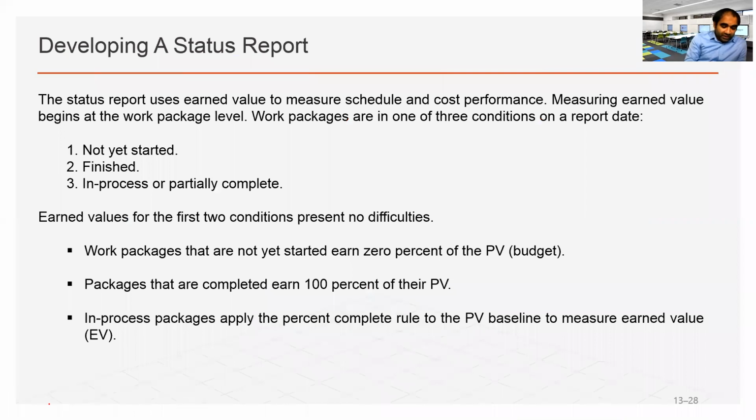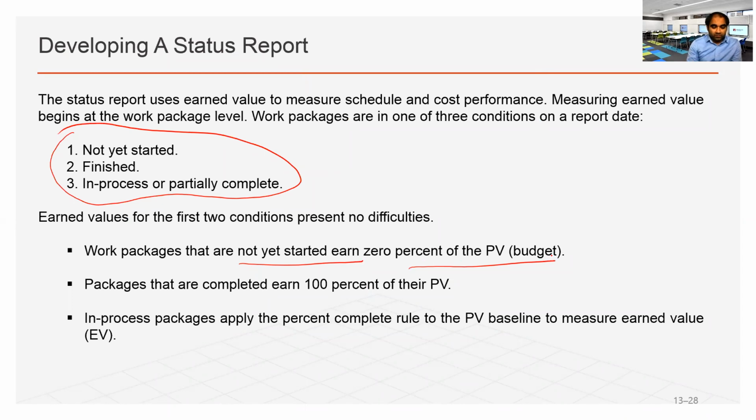In the status report, look into 1, 2, and 3: not started, finished, or in progress. If it is not started yet, earned value will be 0, simple.